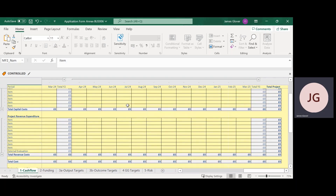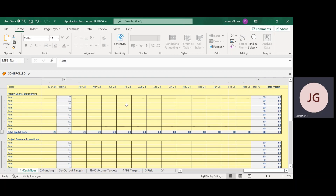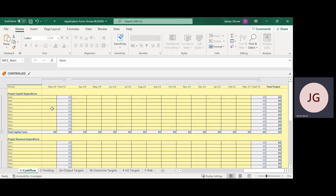For project capital expenditure we need to include all project costs relating to capital expenses, e.g. construction and equipment costs. General headings are acceptable, e.g. groundworks or electrical wiring installation and commissioning of a production line. Professional fees linked to capital costs must not exceed 15% and can be included as capital expenditure, e.g. architect or building project management fees.